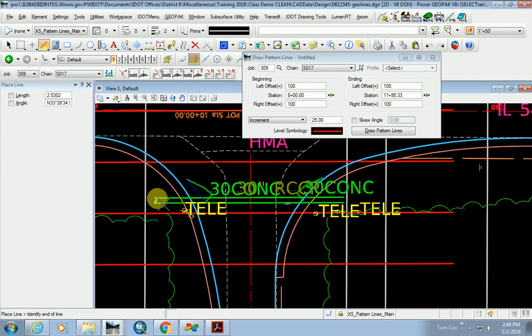Because it depends on what you're doing with the existing. You would probably go ahead and cut one at the existing. Now, when it's time to build this, you're probably going to make the choice. You're going to do two things with the existing culvert if you're going to abandon it. You're either going to remove it or you're going to fill it with flowable fill, like a mortar mix, the CLSM they call it, right? Controlled low strength material. That's right. Yeah, it's like a mortar mix, and they're just going to plug the ends and fill it full and just leave it in place.